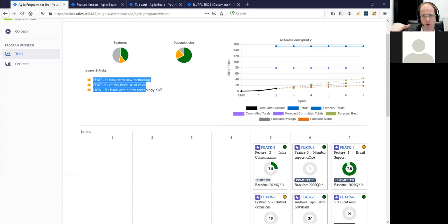So you have the stories or the other issues like risk, spikes, bugs or custom types that you've created. And on top of that, we have one layer, which is technically in Jira an epic layer, but which we call a feature layer. So we support at this moment 2 layers. We're not supporting 3 layers with epics, features, and stories.